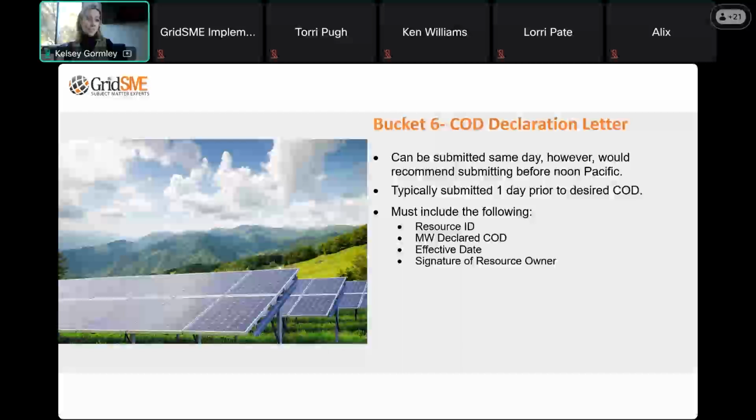It can be submitted same day. Usually if it's before noon Pacific, CAISO will work with us on doing same day declaration. The only issue with that is you would not be able to participate in the day ahead market if you have a same day commercial operation. So that's worth knowing as well.